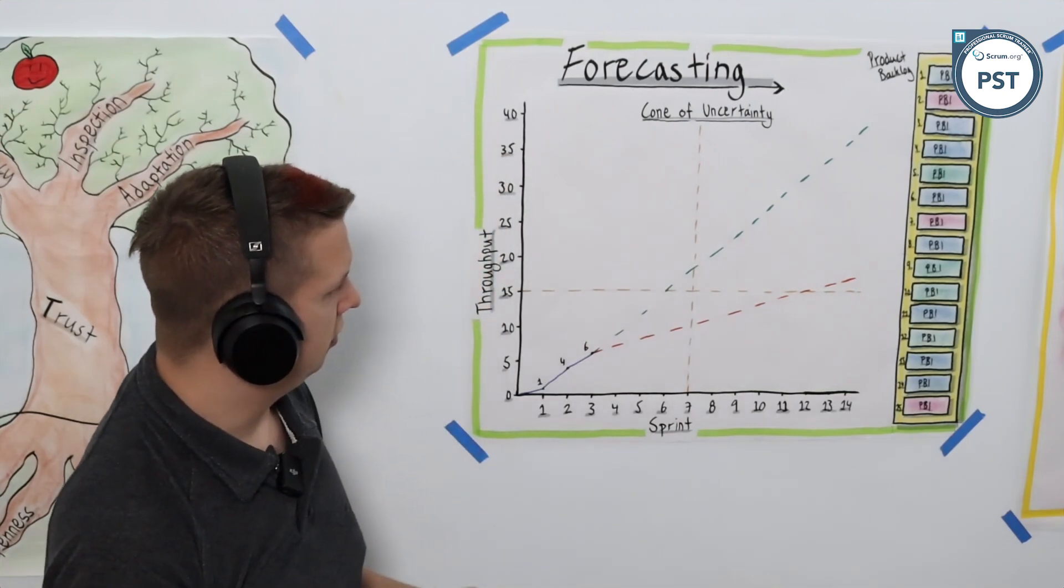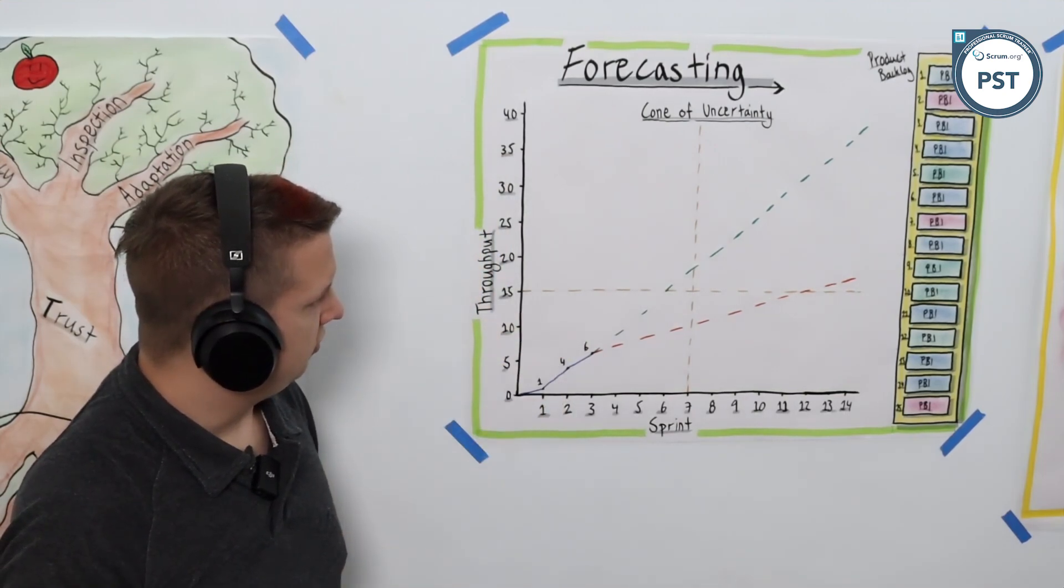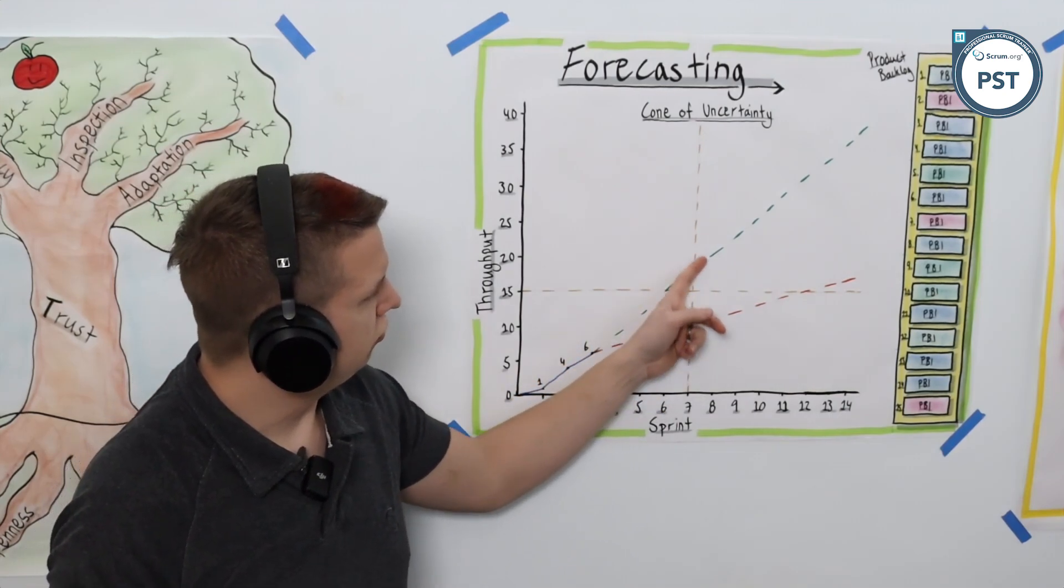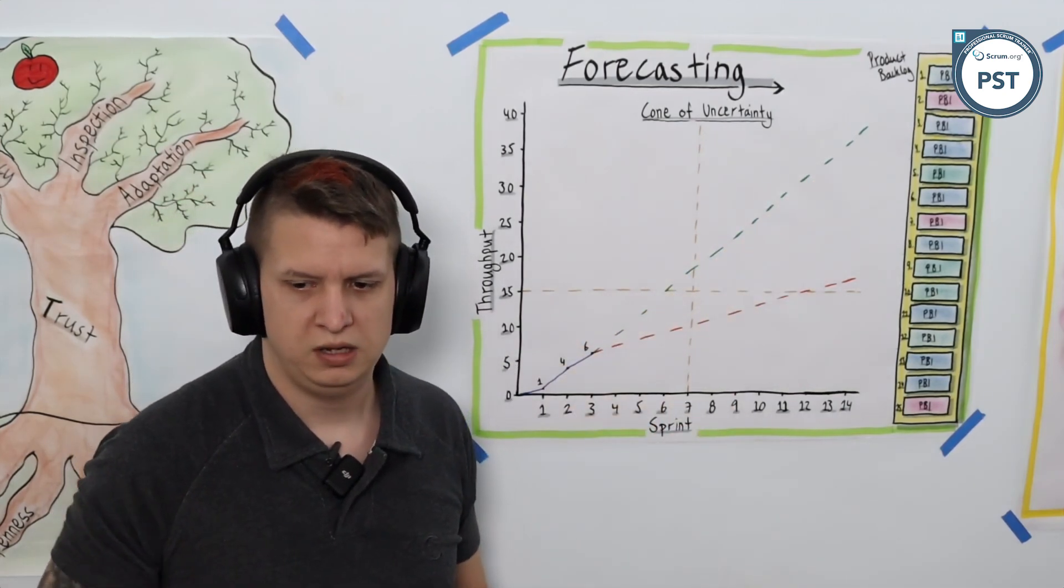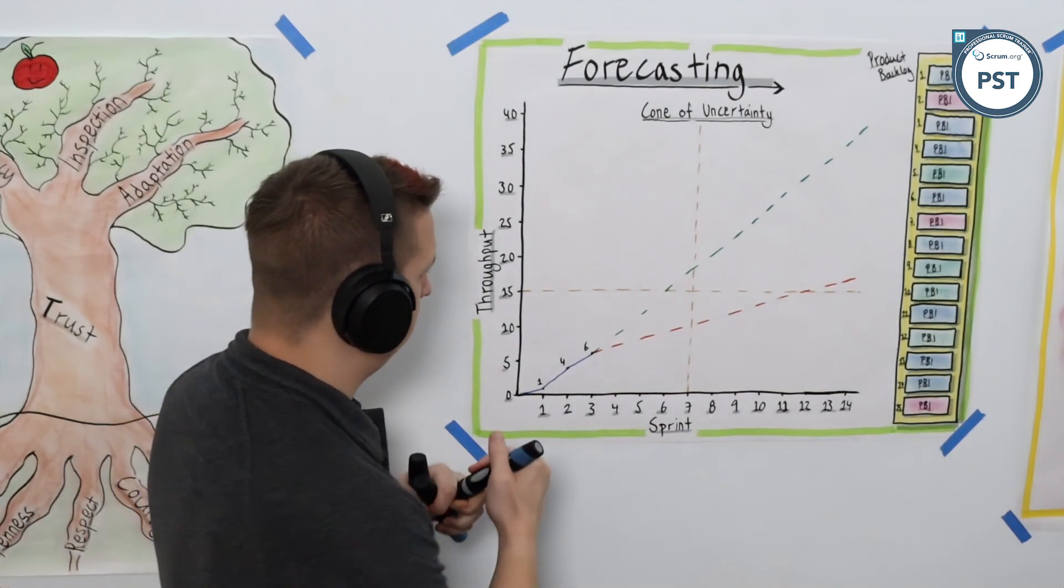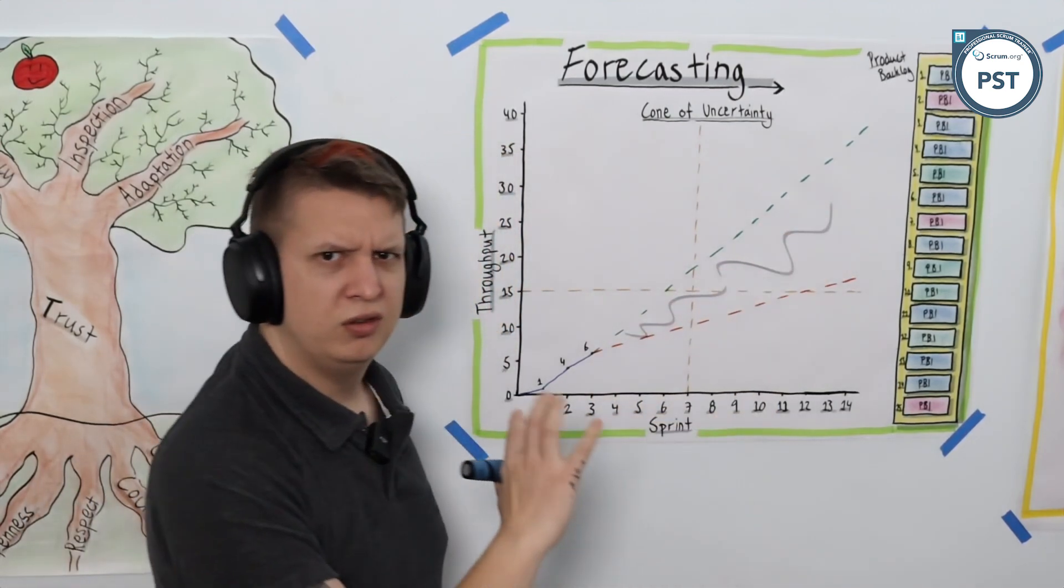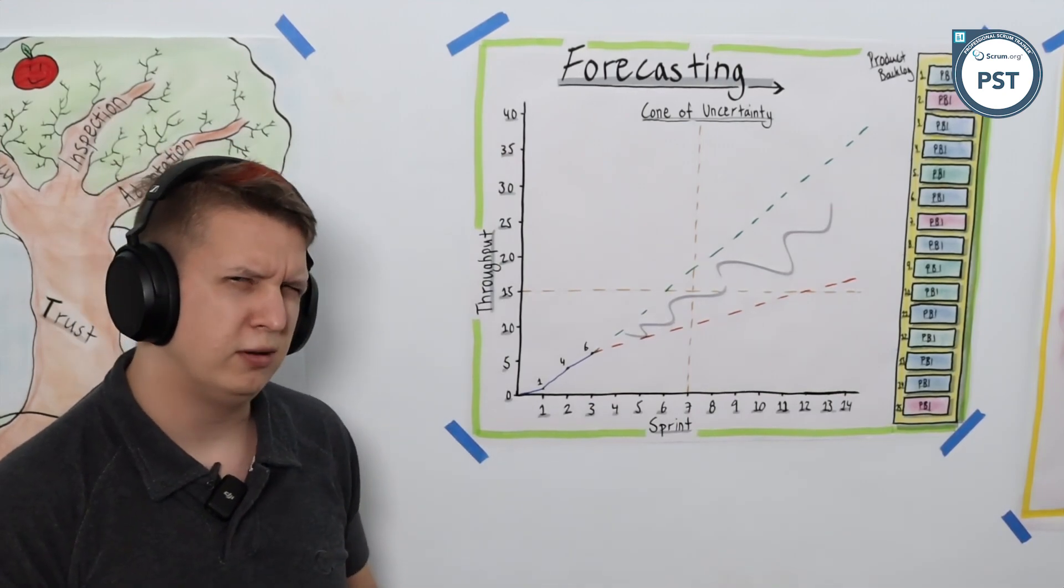Looking at this, we've got ourselves that cone, which means the reality is probably somewhere in the middle. If we want to look at where the average is going to be, somewhere between those two lines is probably what's going to happen.